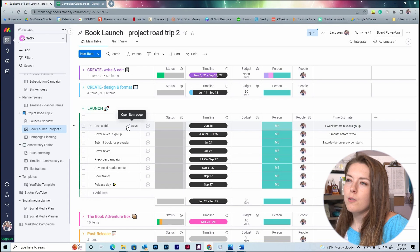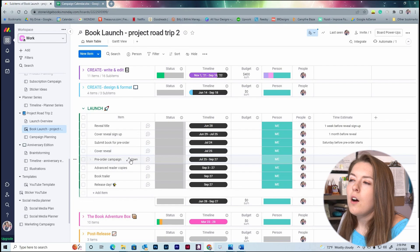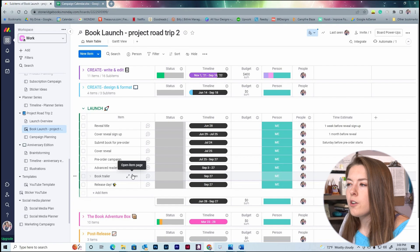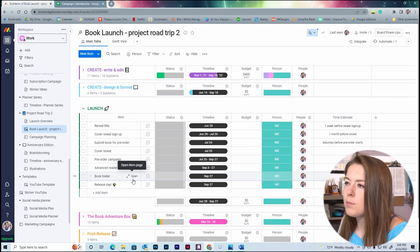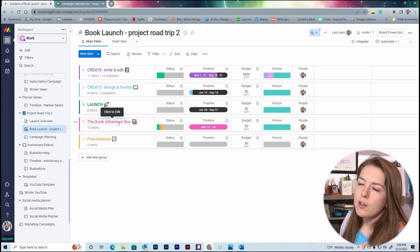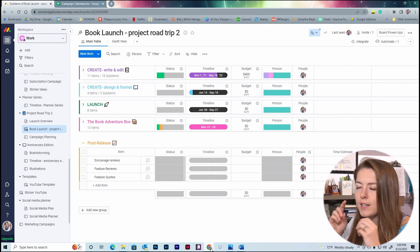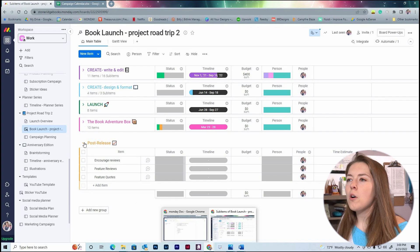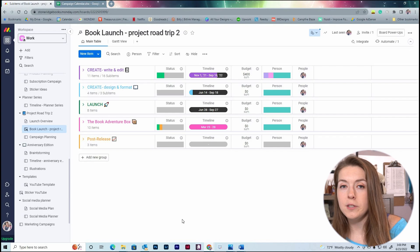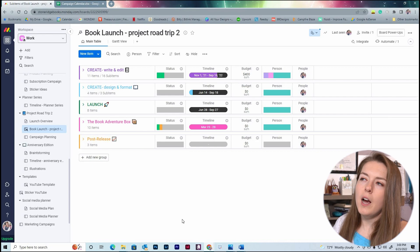Then we'll move on to the launch section, which is super exciting. So we have reveal title, cover reveal sign up, submit book for pre-order, cover reveal the day of cover reveal, our pre-order campaign, advanced reader copies, book trailer, and then finally release day. Now if you're looking at the dates on this calendar, please know this is all tentative. Please don't see these dates and assume this is definitely what's happening because all of this could change. And then we have the book adventure box—I'm not going to open that today because nothing is set in stone. And then post-release I have encourage reviews, feature reviews, and then feature quotes from the book. These are all just quick little marketing campaigns for social media.